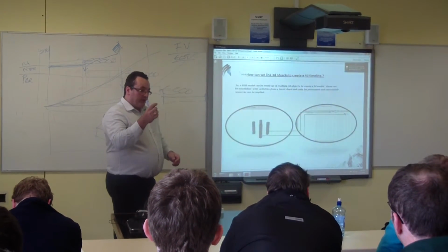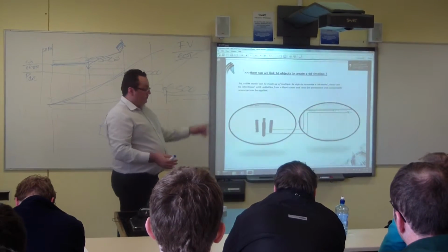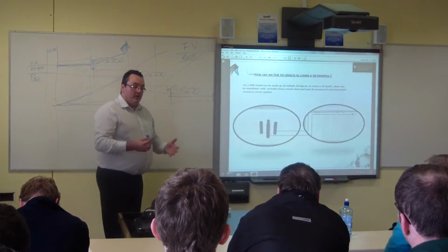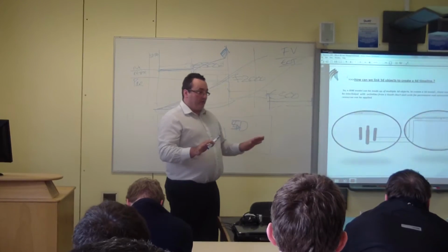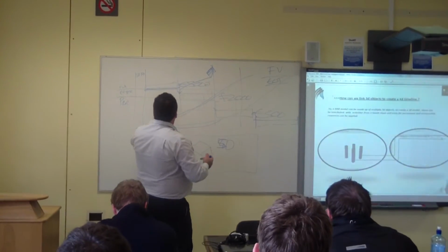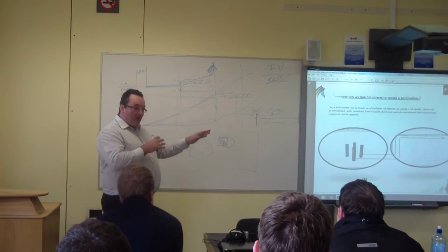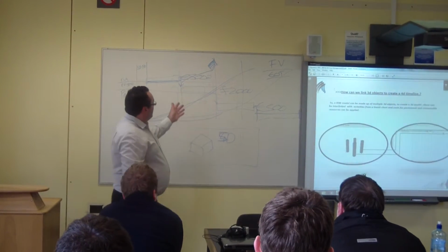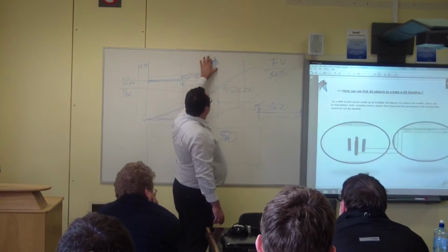What it will say is to convert that over to Excel, but for starters you should put that in there anyway. Under the actual planned costs, it's a baseline cost. Put in your actual costs and your percent complete. Now that's nothing, but anyway, I'll carry on. So whenever you do forensic analysis, lads, use milestones.